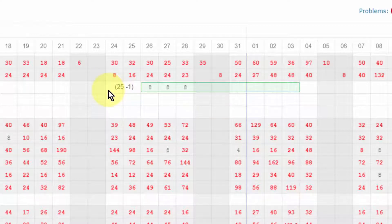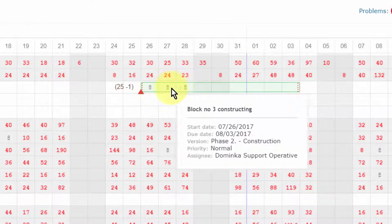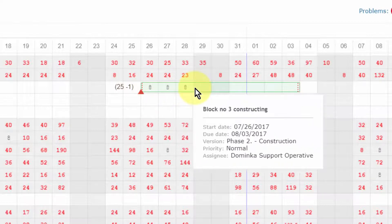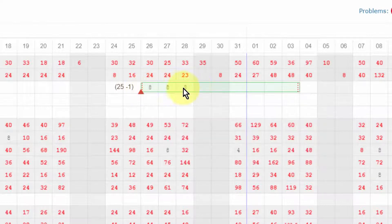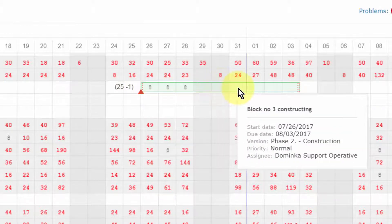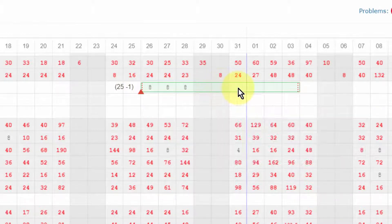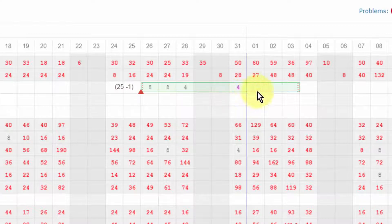Just as easily, you can adjust the automatic hourly distribution per days, weeks, or months by simply rewriting the numbers in the square boxes like here. As in the Gantt chart, you can change the timing of the tasks using drag and drop.